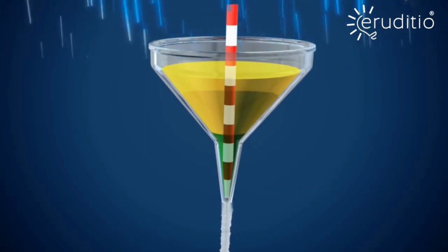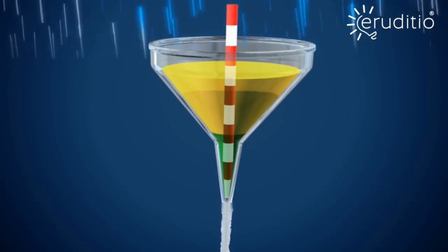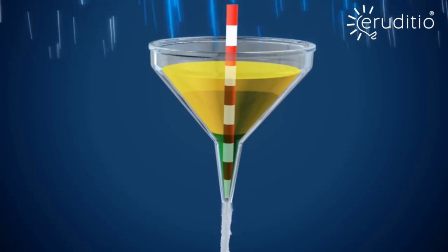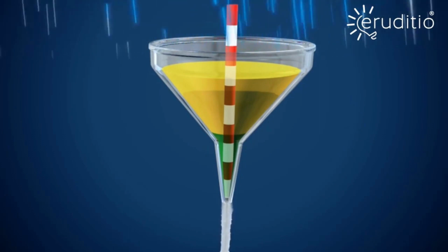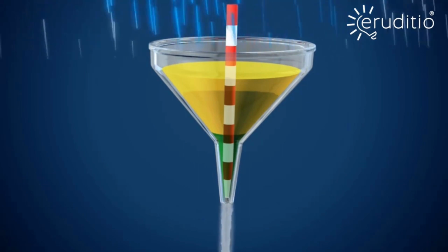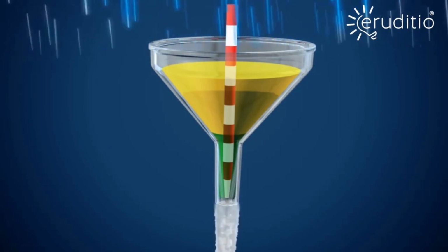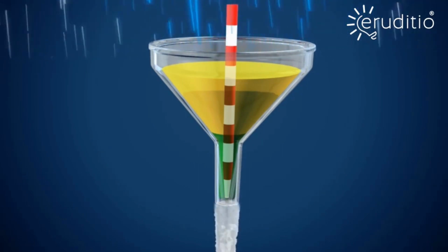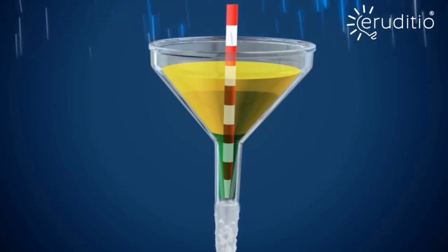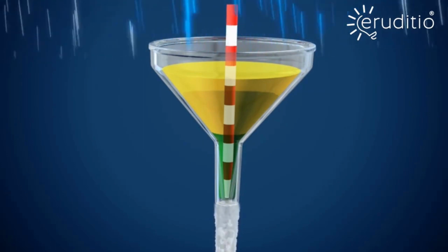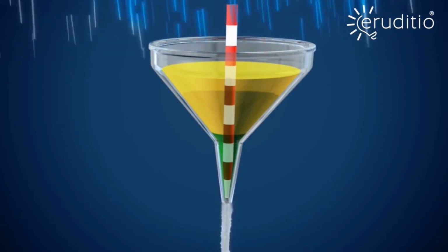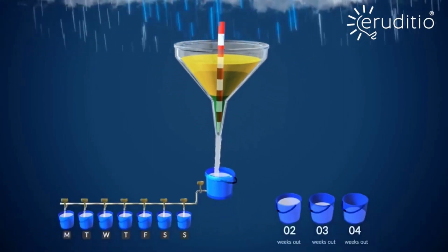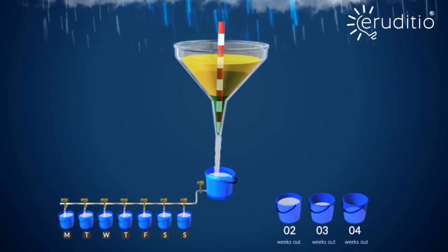The neck of the funnel in this analogy is our maintenance resource hours. It is like a valve where we control the outgoing flow of work into the weekly schedules. If we don't open the valve enough by having enough resource hours to execute the approved work in a timely manner, our backlog will continue to grow. On the flip side, if we have it too far open, with too many available maintenance resources, then we will run out of ready and then total backlog.